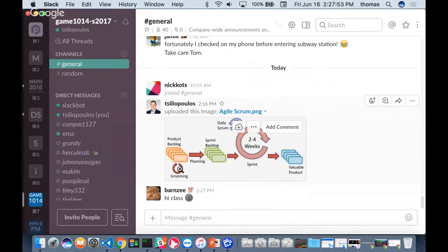High, medium, or low? Pretty high, right? So we have this idea of high, medium, or low priority for my user stories, right? And I'm going to try and knock off all the high priority user stories in something called a sprint. So I take items from my product backlog. I have my entire product backlog in sticky notes on a board, as an example, right? And I take these items from the product backlog and include them in something called a sprint backlog.